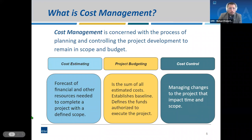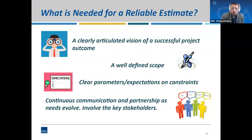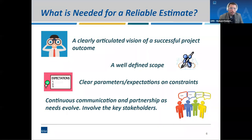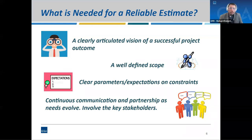What is needed for a reliable estimate? It is really important that we have a successful, clearly articulated vision. If we don't have a vision of the project, we're going to be scoping an item misaligned with what your stakeholders envision. Scope definition is critical — the more details, the fewer assumptions the estimator has to make. Knowing where the project is going to take place helps a lot. And stakeholder communication early, often, and continuous is really important. We need to calibrate estimates as needs evolve from the planning stage.